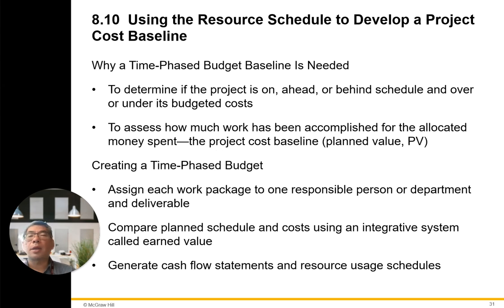Number 10, using the resource schedule to develop a project cost baseline. A time-phased project baseline is needed basically to determine if the project is on, ahead of, or behind schedule, or over or under its budgeted cost, and to assess how much work has to be accomplished for the allocated money spent for the project baseline.